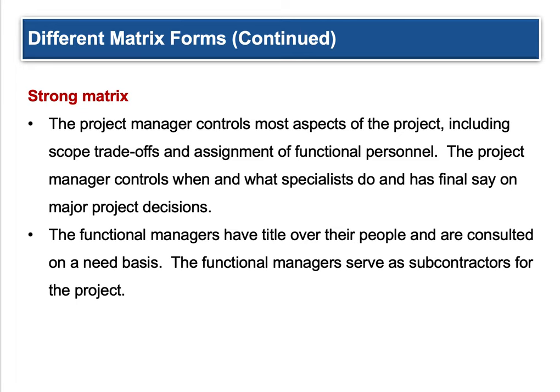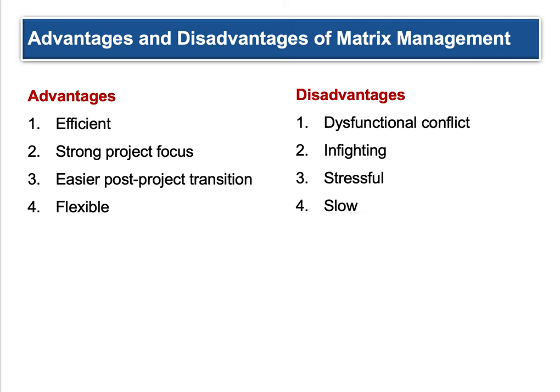In a strong matrix, the project manager controls most aspects of the project, including scope, trade-offs, and assignment of functional personnel — they have more power. The project manager controls when and what specialists do and has final say on major project decisions. This is kind of where the company is set up specifically for projects. Functional managers maintain title over their people and are consulted on a need basis, serving essentially as subcontractors to the project. Advantages of matrix management include efficiency, strong project focus, and easier post-project transition. Disadvantages include dysfunctional conflict from having two bosses, stress, and the risk of slow progress when people have too much on their plate.